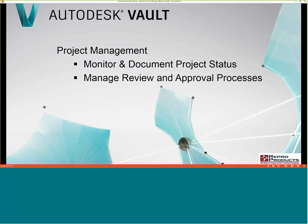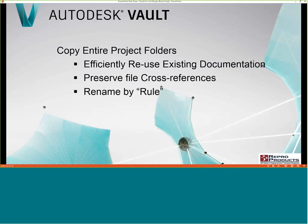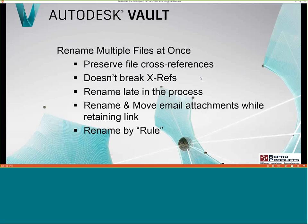On the project management side you can track the status of multiple drawings — whether they're work-in-progress, for review, or for construction — and see how long they've been in that state. You can set up an engineering change order approval process that routes documents around. You also have the ability to copy entire project folders — making copies, updating all xref files, and renaming them, such as appending a word like 'archive.' You can create rules to do all that.